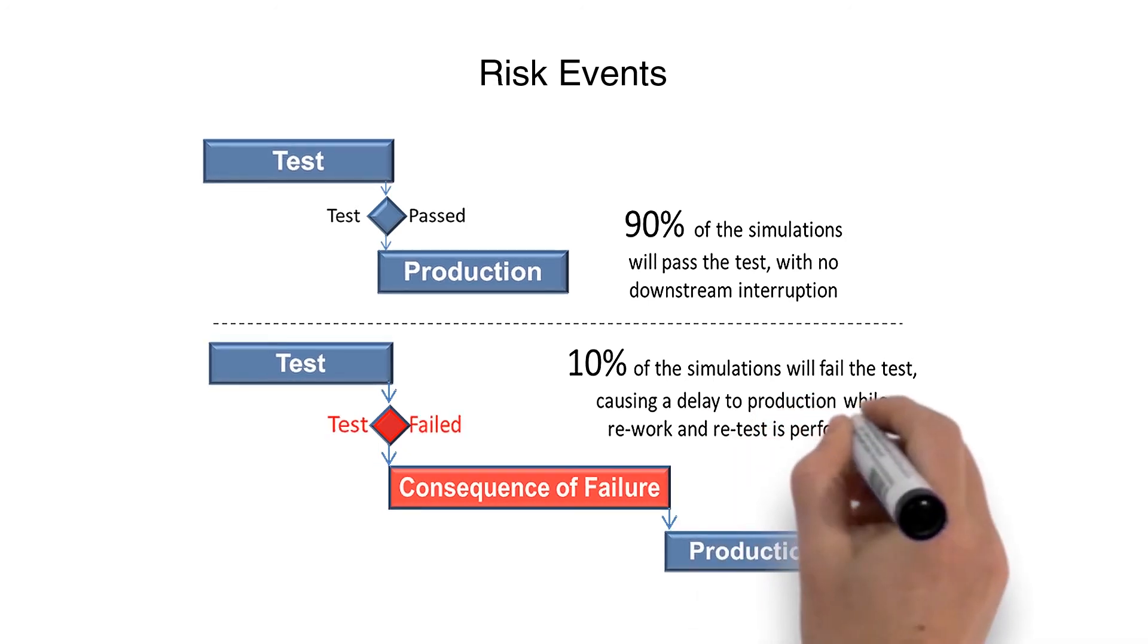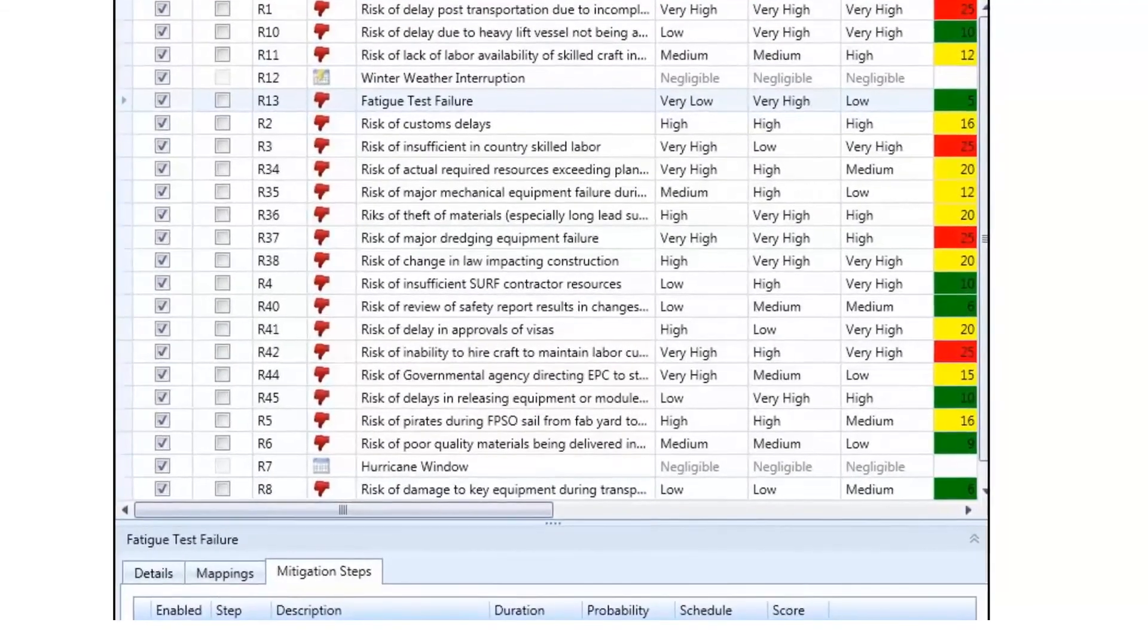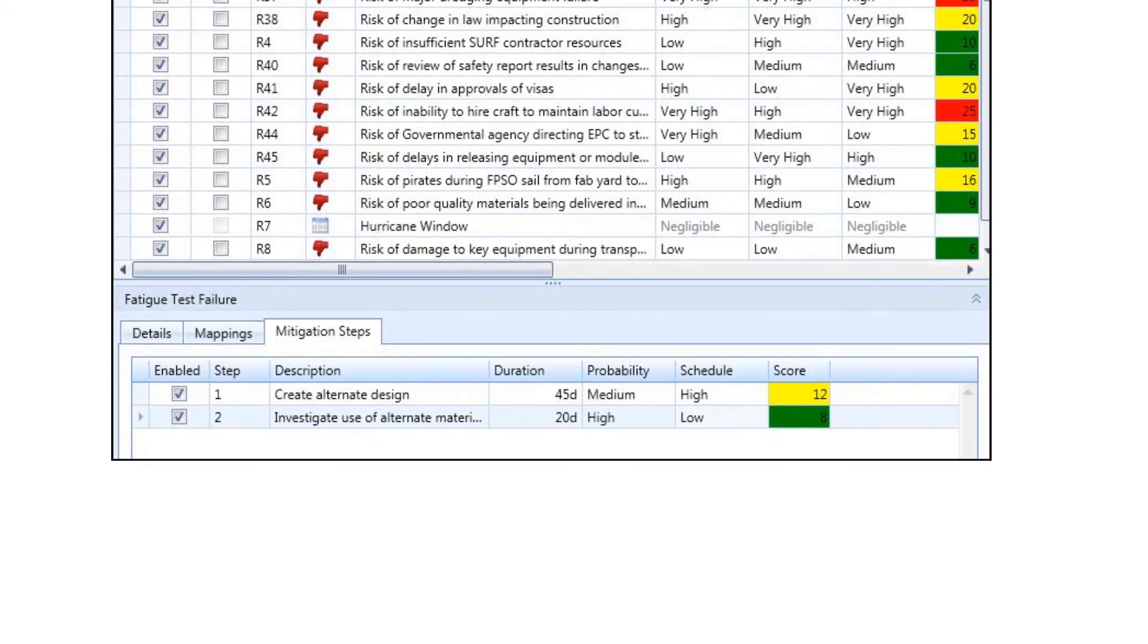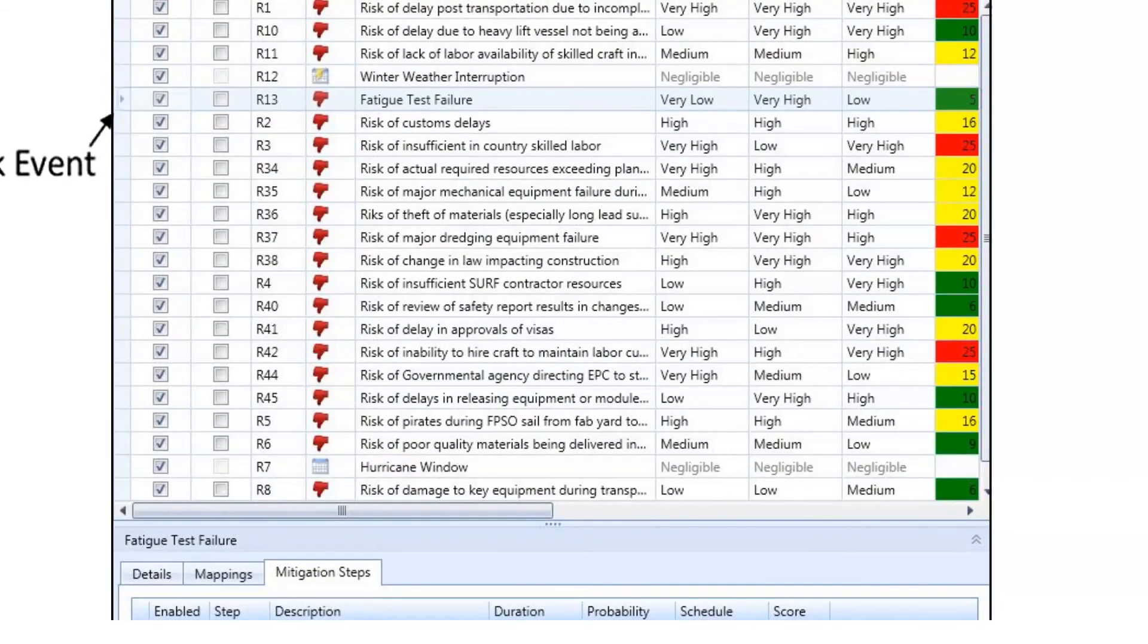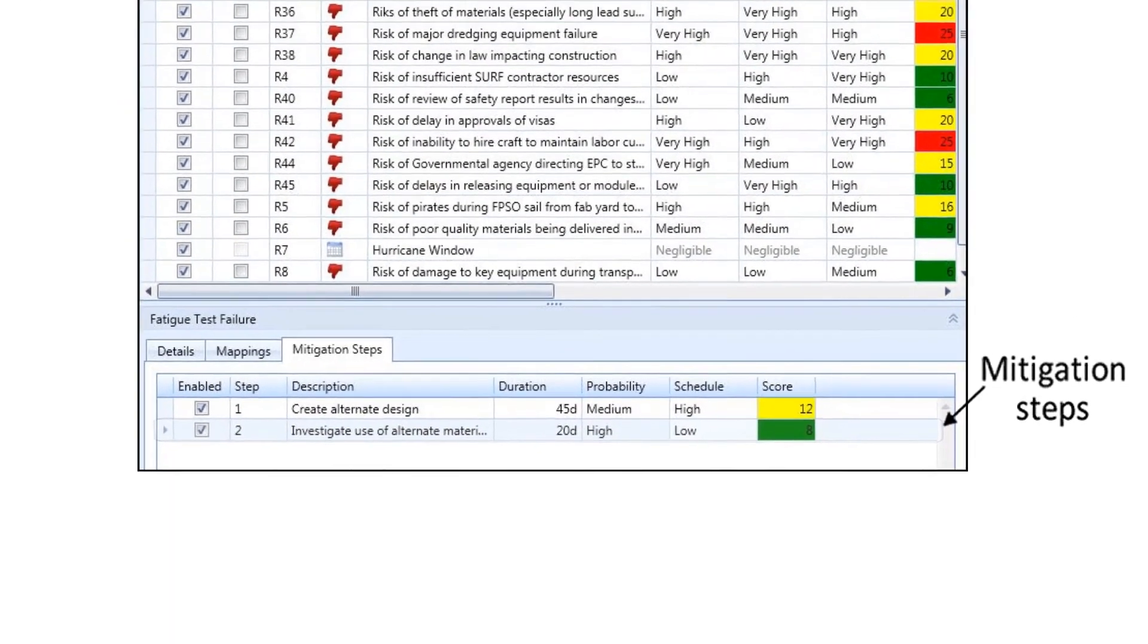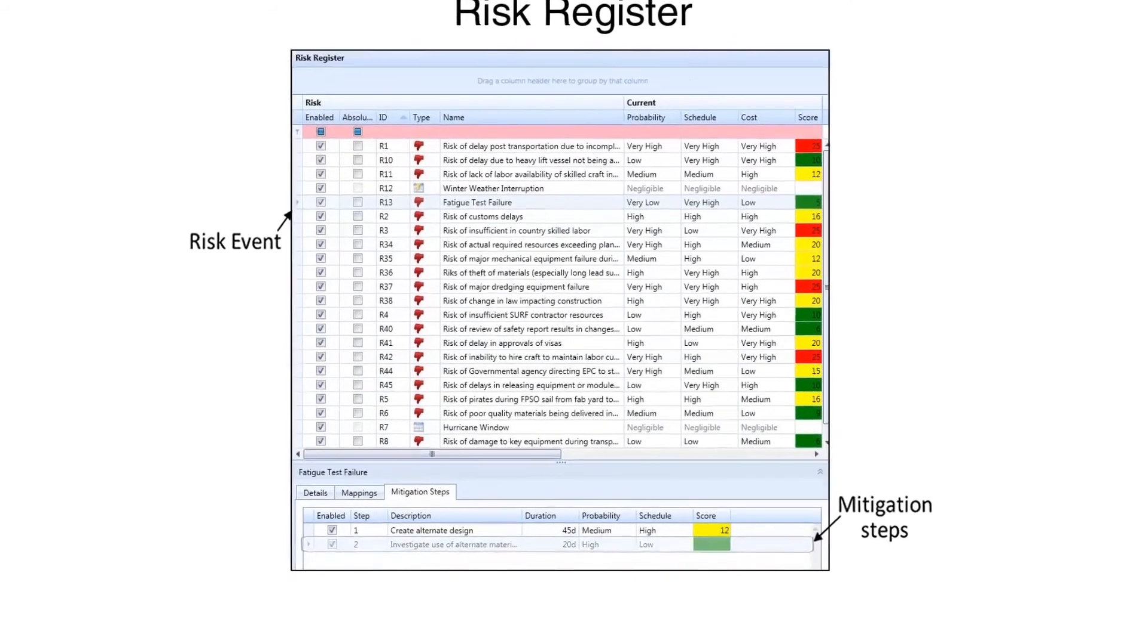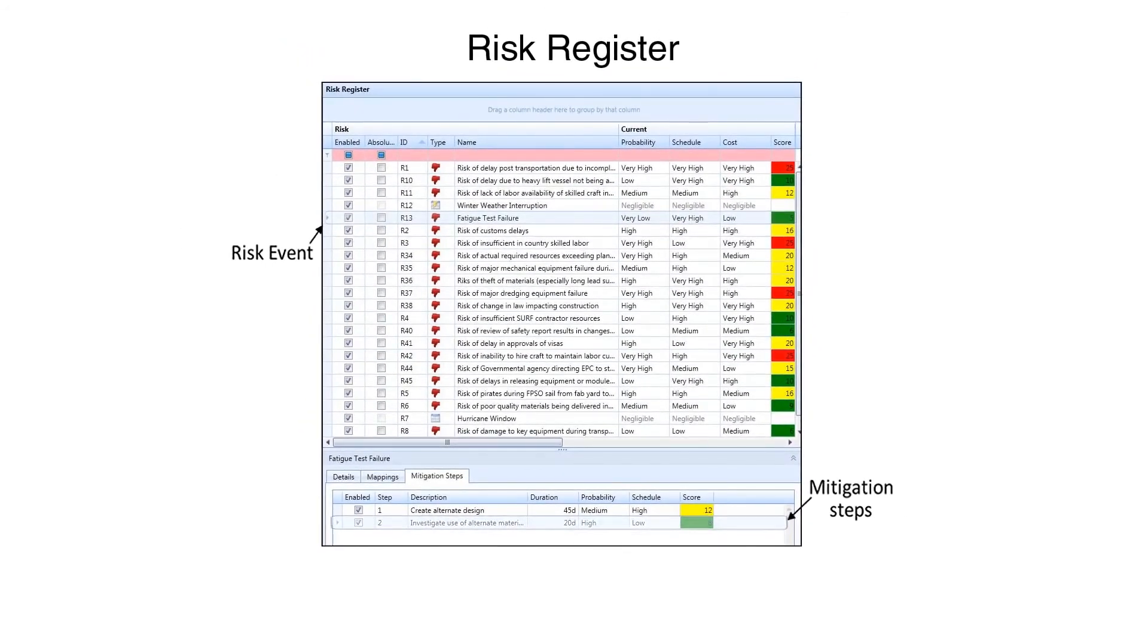This is not a problem with a Schedule Risk Assessment. An SRA can quantify the risk and provide information on the likelihood of successful deliveries. Acumen does not stop there, though. One of its newest features is to organize and track all risk events within its built-in risk register, as well as to track the steps being taken to help mitigate that risk. Or, if your organization already maintains an external risk register in Excel, it can be imported into Acumen to eliminate the duplicate tracking of risk events. A single risk event can then be mapped to one or more activities, or a single activity can be associated with one or more risk events.